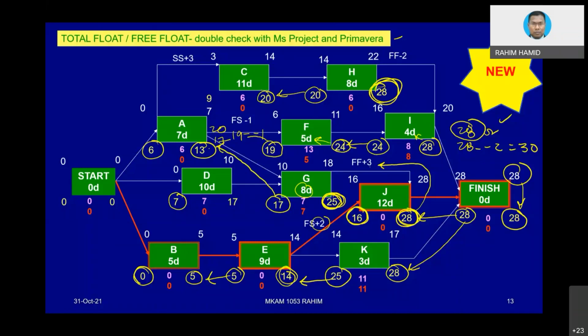But there is another value coming from C. That value is not coming from the back, but from the front. That is the tricky thing. When the arrow is coming from the front, we must consider the front value. The front value of C that we must consider is 9, because it is based on the relationship.